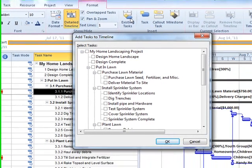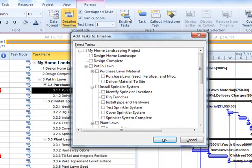This brings up the entire Work Breakdown structure. Choose all tasks and milestones that you want displayed on the Timeline.